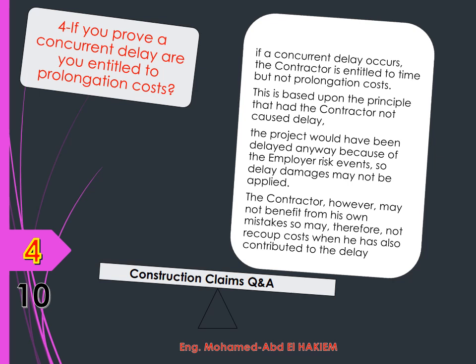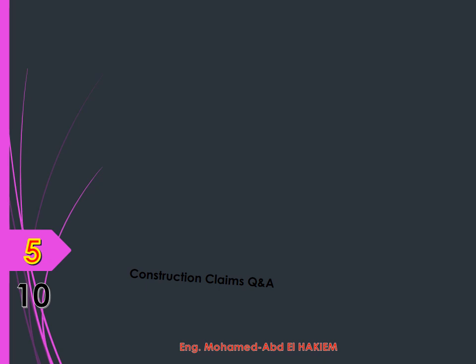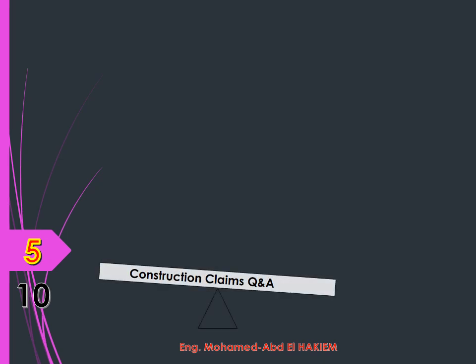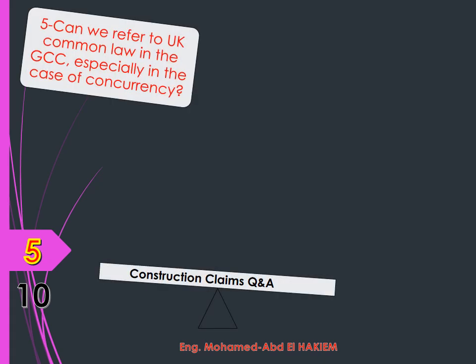Question 4: If you prove a concurrent delay, are you entitled to prolongation costs? Answer: The general principle is that if a concurrent delay occurs, the contractor is entitled to time but not prolongation costs. This is based upon the principle that had the contractor not caused delay, the project would have been delayed anyway because of the employer risk events, so delay damages may not be applied. However, the contractor may not benefit from his own mistakes and may therefore not recoup costs when he has also contributed to the delay.